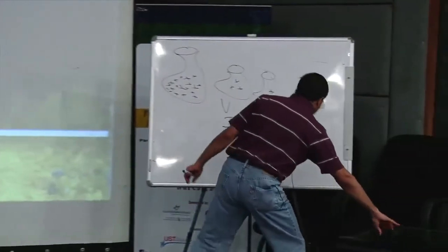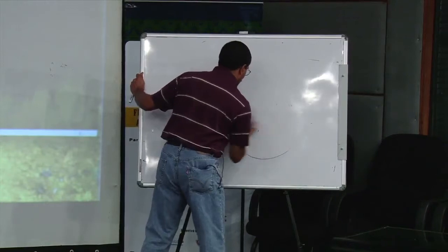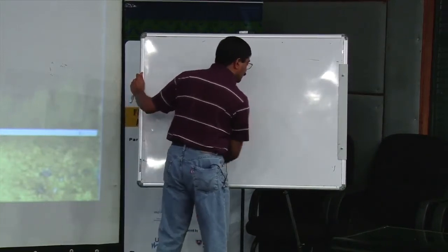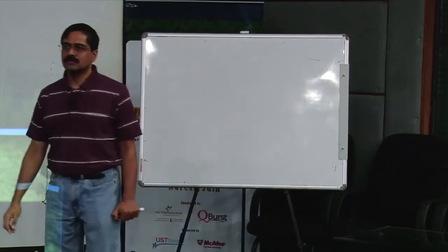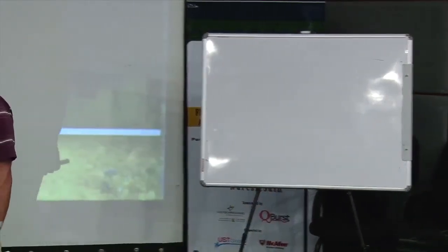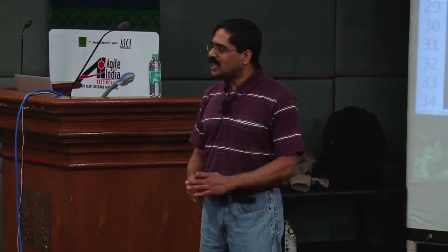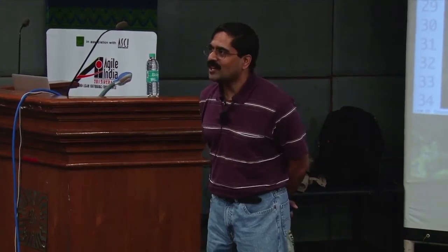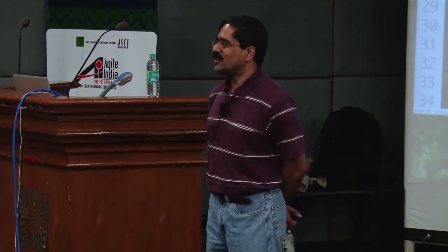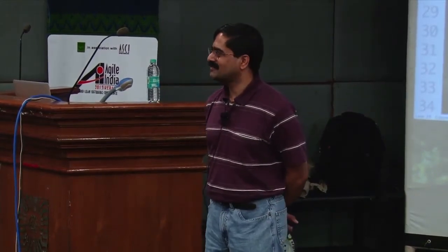Imagine this for a minute. Imagine I have to make a decision. Somebody during the break was telling me, oh, Venkat, we got to make some decisions up front. Well, no. Don't convince yourself you have to. The gentleman said, oh, I have to decide on day one the OR mapping tool we have to use. No, we don't. I actually worked on a project for a bank. We very clearly decided we are not going to decide the OR mapping tool until the 4th iteration, 4th sprint.